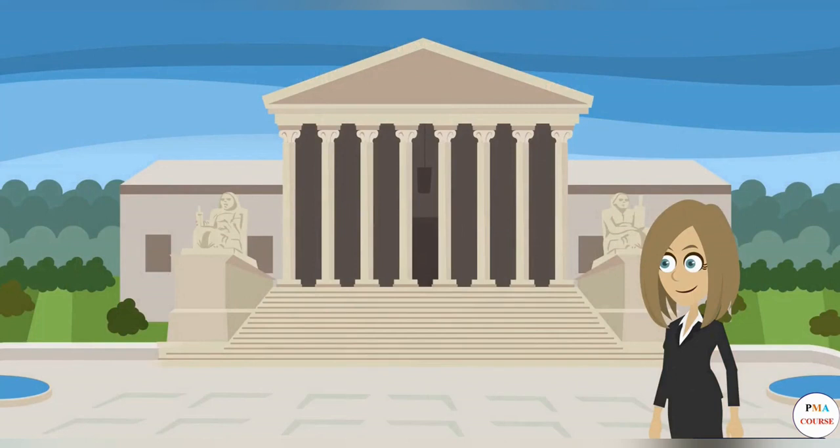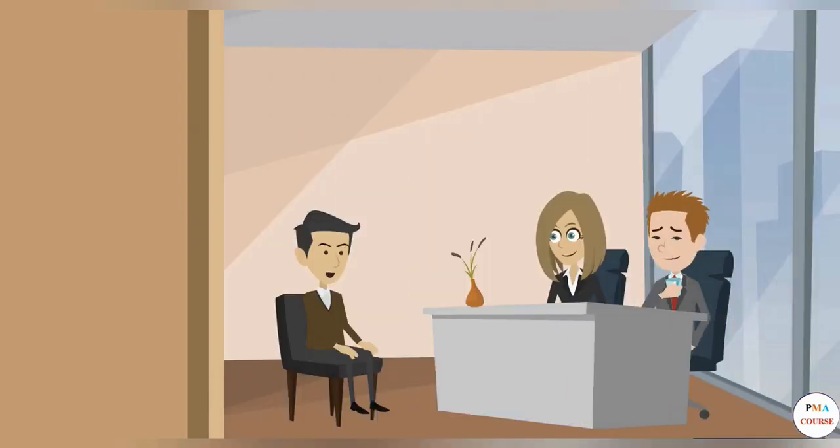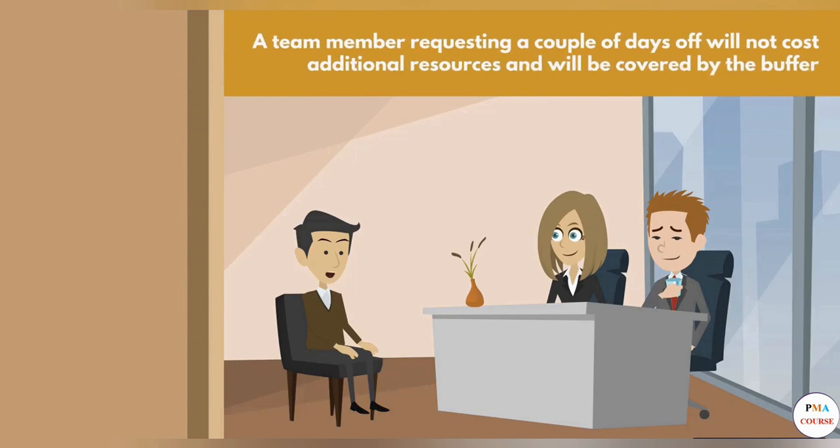It is worth noting that the project manager will be the one to decide if a change that's proposed needs to actually go through this rigorous process. For example, a team member requesting a couple of days off will not cost additional resources and will be covered by the buffer, so it doesn't require a lengthy process at all.